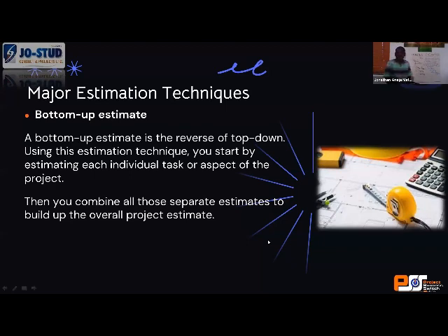You multiply it by the price of block, you get the quantity of sand, get the price of the quantity of sand, and you get how much a mason charges to lay a block. Let's say 40 naira, 40 naira times 1,200 blocks, you get all that cost. I'm just assuming everything amounts to 120K. You put your 120K here.